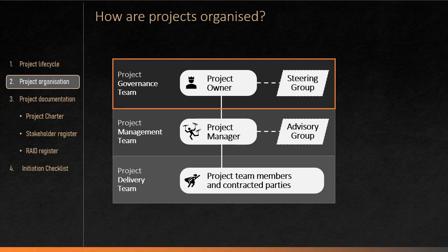The project owner, supported by the steering group, shall ensure that the project has a clear, valuable, and justified goal, a competent project manager is assigned and provided with necessary authority, resources, and support, project performance is effectively monitored and controlled. And finally, that the project is terminated in a timely manner if the project risk becomes too high or the project no longer promises to deliver sufficient value.